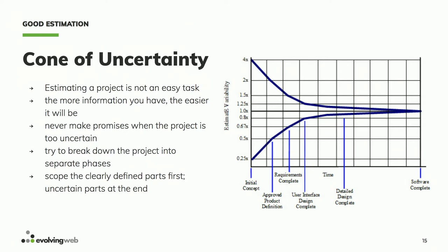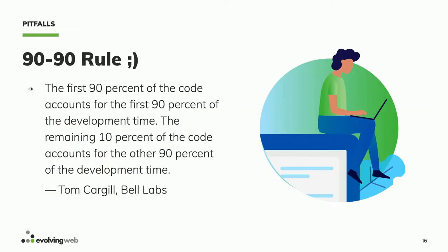The way we hit our estimates is not because we're so amazing at estimating, but because the estimation process doesn't stop when the estimate is done. We redefine the project scope at every single step to make sure that it still fits. All great project managers do it. Clients are happy when you do it, and they're very unhappy when you don't. So that's a life lesson.